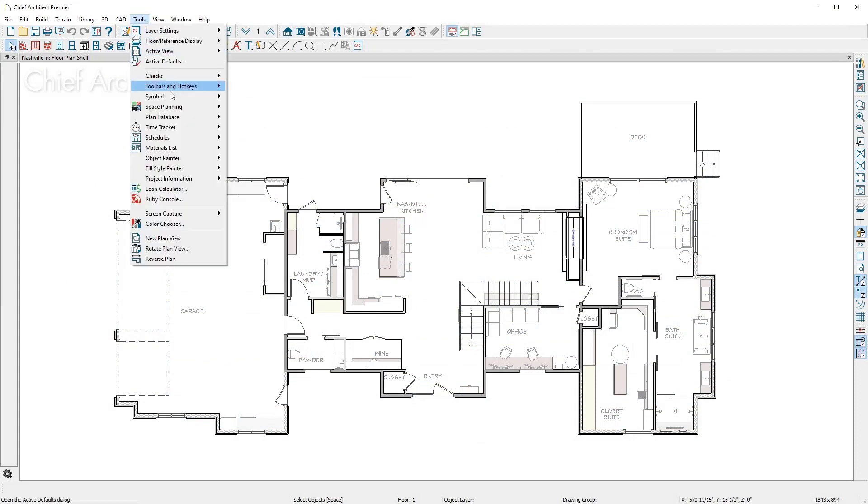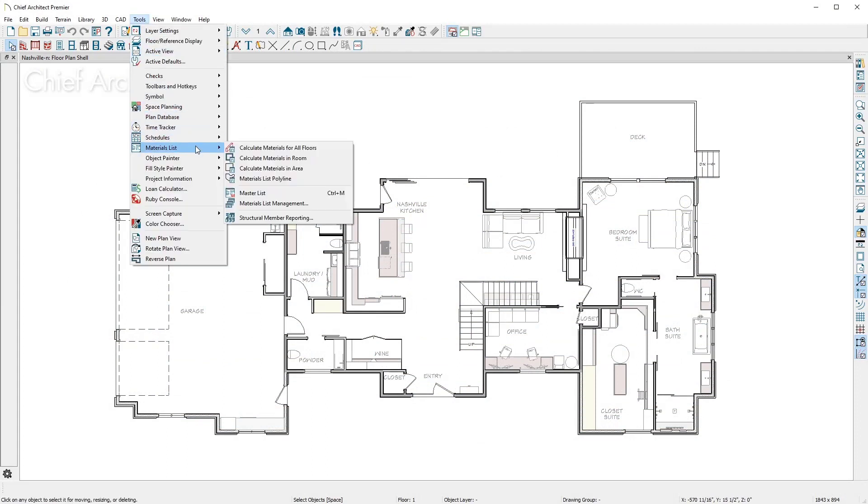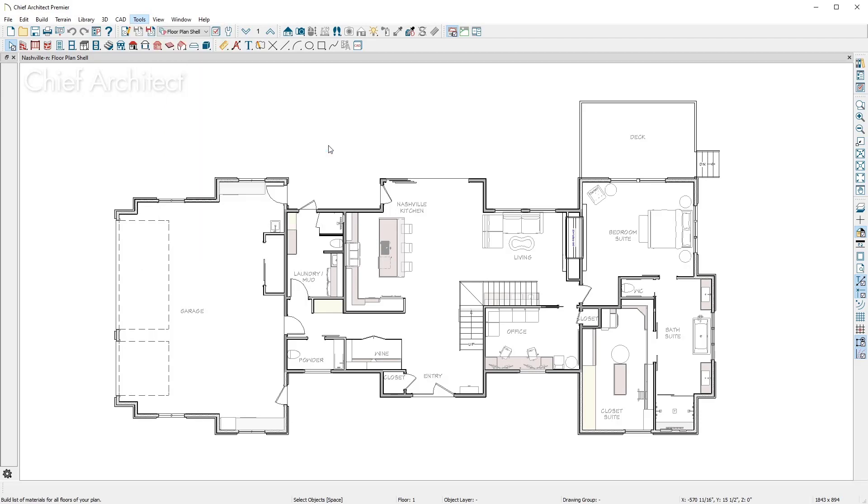The materials list can calculate by floor, by room, or by area, which can be helpful for remodeling projects. For now, let's calculate the materials from all floors.